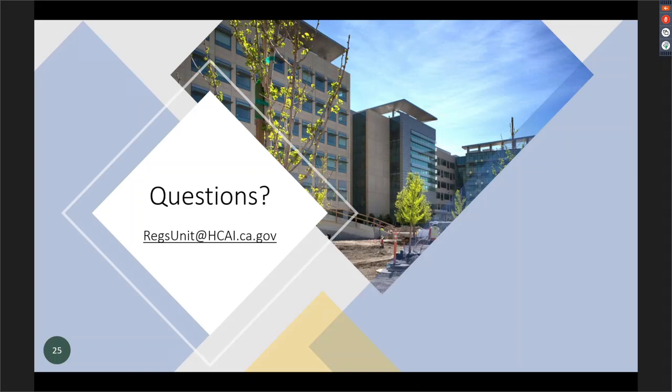All right, I don't know if we have a question or not, but if you have a bunch of NMAs on an ACD, we probably will review it. We'll probably also mention that these don't need to be ACDs because again, it's going to take more time. You have to pay to have the ACD reviewed. You don't have to pay to have an NMA concurred with. Something else to keep in mind.